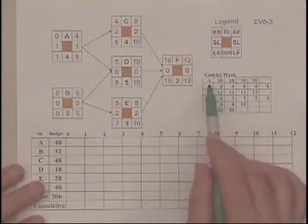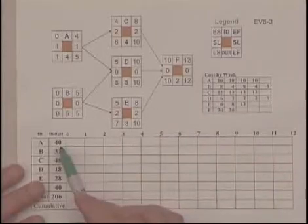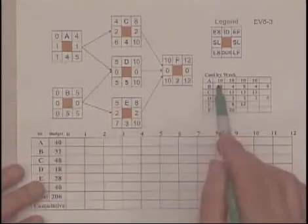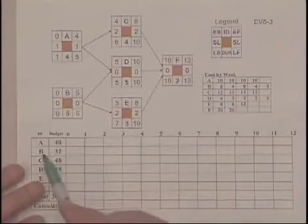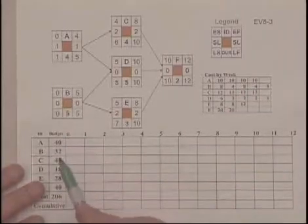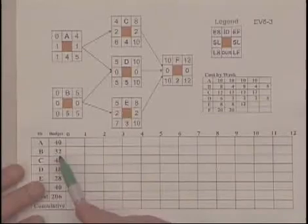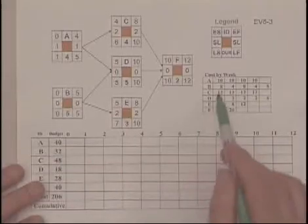For example, Activity A has a total cost of let's say $40,000 and it's $10,000 across the four months. Activity B, which is supposed to take five months, has a total cost of $32,000.